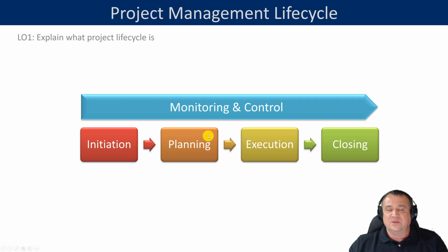For example, a lot of times when people submit their work breakdown structure, I see that they're missing the monitoring and control phase. For some reason, they plan for the project without planning for monitoring and controlling of the project throughout the entire duration of the project. Or sometimes I see some work breakdown structures are missing items related to the closing phase, such as a lessons learned report. So this is what the project management lifecycle is. Again, it's a combination of the most important phases that most projects go through.